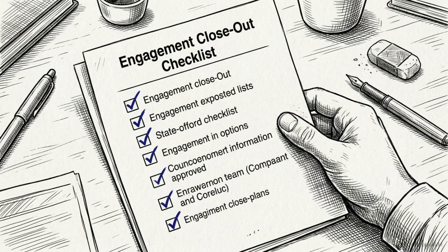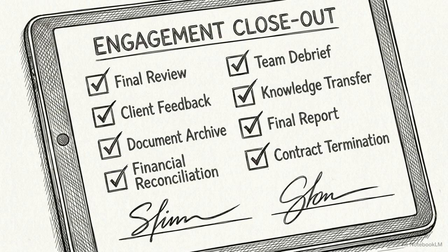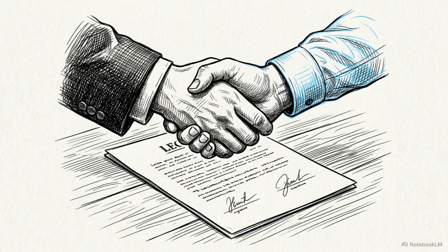With the sections filled out, you reach the final closeout checklist. Verify all previous sections are marked complete, and ensure all digital assets, passwords, and access have been fully transitioned to your team. The final action is to secure the document. The closeout page requires formal digital signatures from both the business owner and the consultant. Applying these final signatures formally transitions system ownership and operational authority from the consultant directly to your internal team.